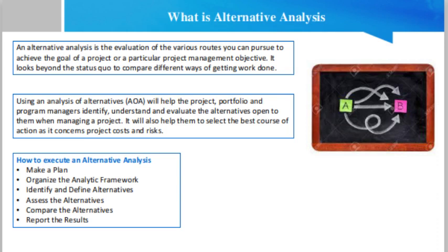Identify and define alternatives. Now you identify the various alternative routes you can take from the data sources. There will be many, but be sure to keep one as the status quo. These alternatives will address the problem you stated in your plan within the context and scope you have already defined. The alternatives you evaluate must come out of thorough research, vetting, and filtering before you can begin the decision making process.